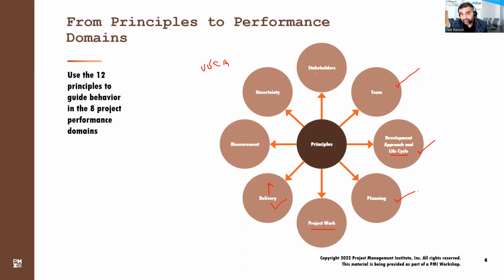And last but not the least is stakeholder engagement, very important. We should be identifying our stakeholders as early as possible in the project. We should be recording stakeholder interest, their influence, their status, whether they are supportive of the project, or engaged with the project, or neutral to the project. And as per their stakeholder engagement analysis, we should be developing the right communication and engagement plan so that we can effectively engage our stakeholders throughout the project with the help of a stakeholder register, for example.